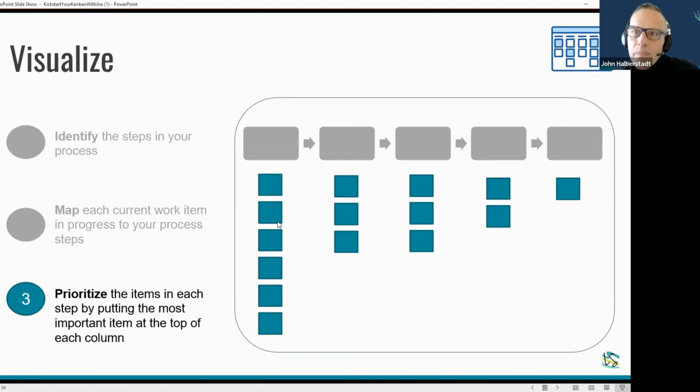So again, we talk about this in the context of Jira. You can use any tool, but if you're using Jira, literally selecting those cards or those little rectangles, which are analogous to what cards or sticky notes used to be for us from the olden days, literally dragging them up and down based on the relative priority, as Cate had mentioned. The board telegraphs that signal that the stuff that's higher up on the top is of priority.